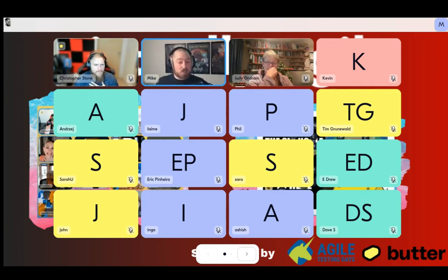So team does not set a sprint goal. Well, that's something Scrum says we should do. That's a dysfunction. And so something you might start to notice here as well is actually some of these things might relate to each other, right? Because the symptom of the team constantly feels overwhelmed by work could potentially be related to that dysfunction. Team has 2 product owners. Could that potentially be why it takes a long time to agree on backlog priority? We're always waiting on the UX team. So I actually think that one might be a symptom, and I think that might be related to the fact that we're not cross-functional. Scrum Master runs the daily Scrum. Maybe that's why we think it's a waste of time. And no definition of done might be why we are constantly raising bugs.